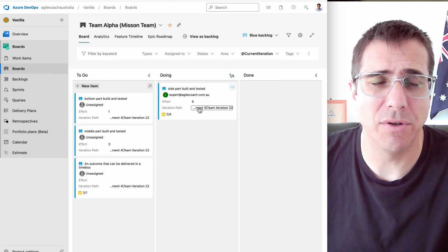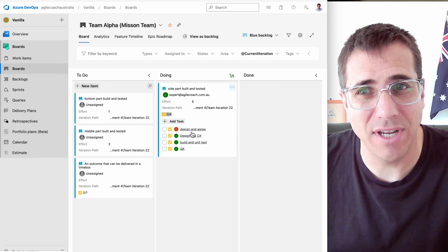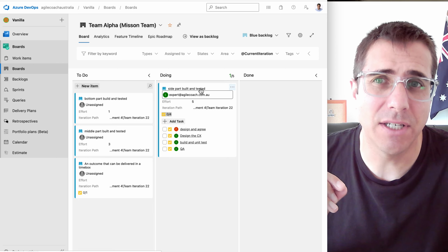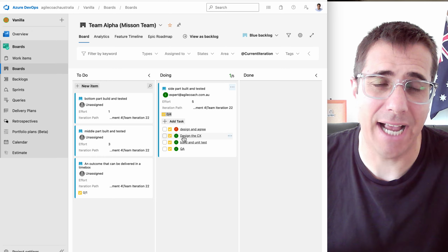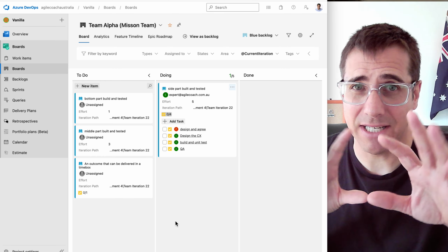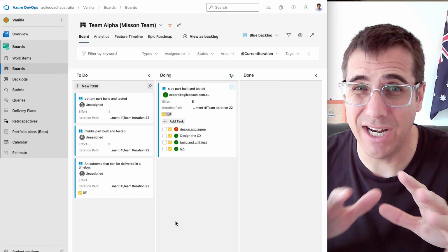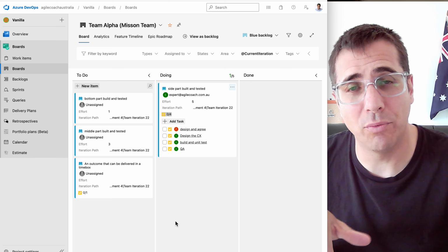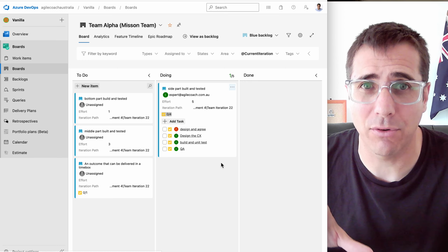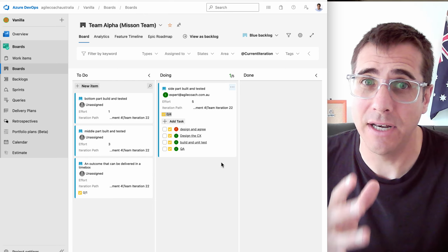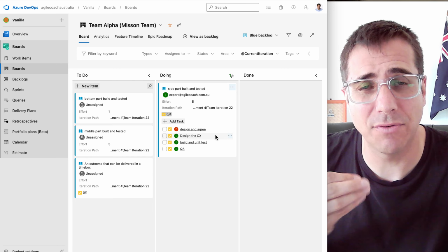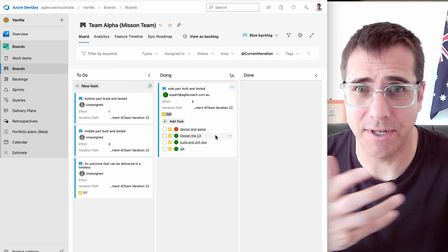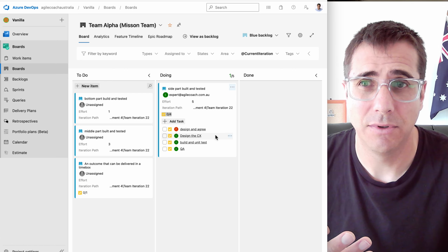And then what we do is we walk through those cards, but the detail is really in these, because this card's the outcome which you're really looking at from beginning to end of sprint, and here are the tasks. Now, if you're operating where you're a bit tasky at this level, it's not really how we want you to work, but this board will work. But once you start to try and get team outcomes planned in sprint planning rather than individual tasks, you really need to get into that little bit more detail to talk about people's activity on the day to see if they need any help. That's what we really get into.